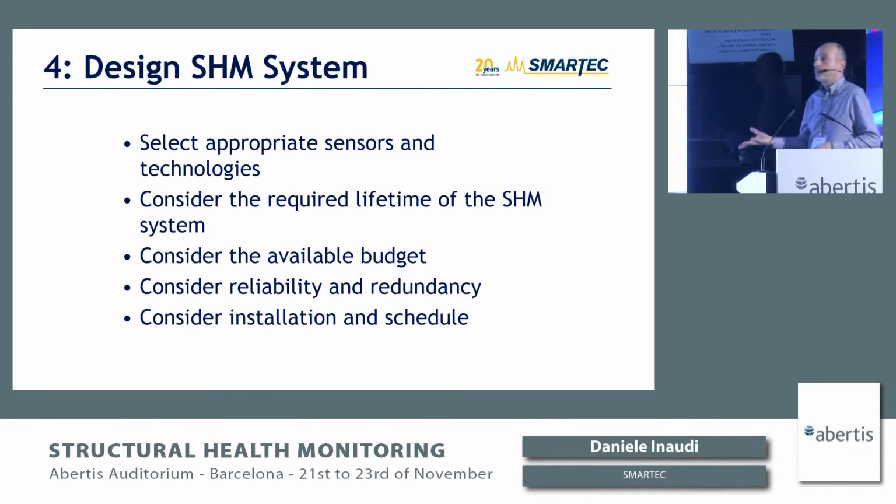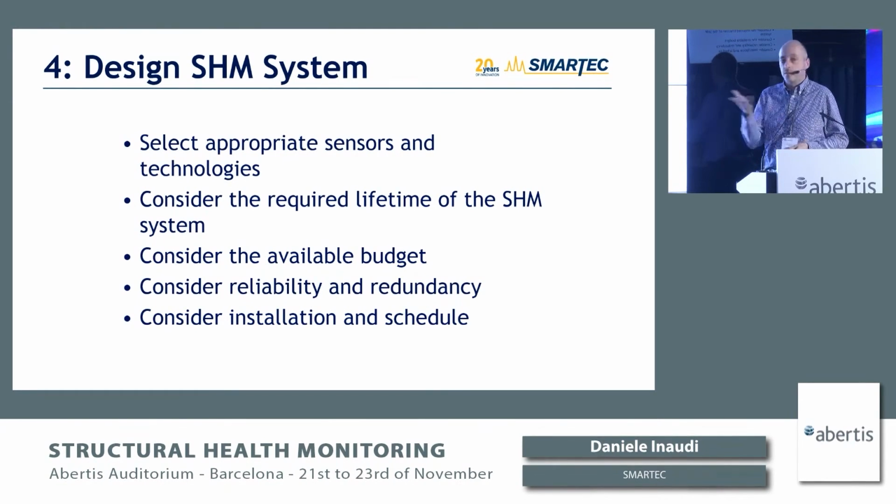Is it possible to install the sensors during construction? We saw this morning examples of using wireless technology that enables you to install sensors in an early phase of construction. That would be a good example of taking into account the construction schedule and sequence when considering the design of a SHM system.